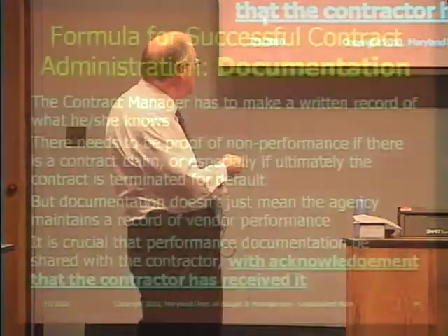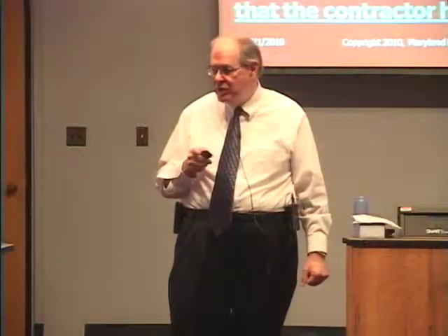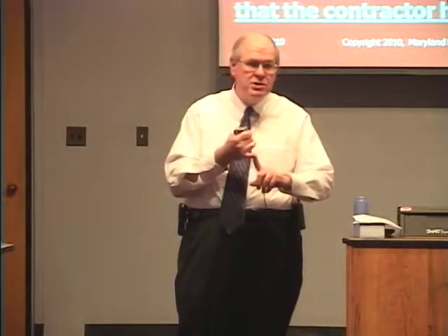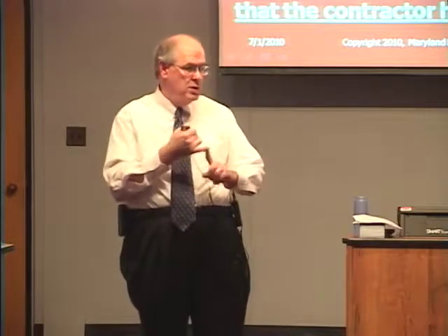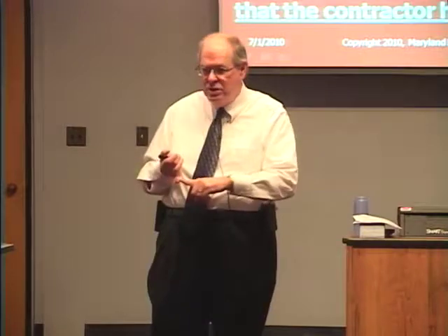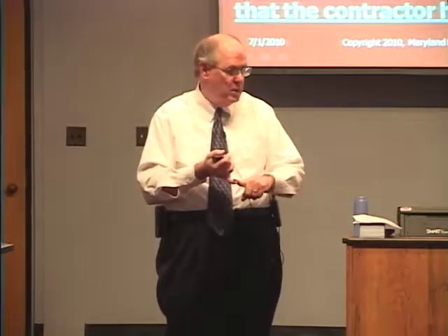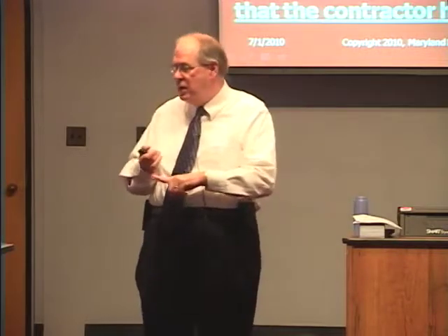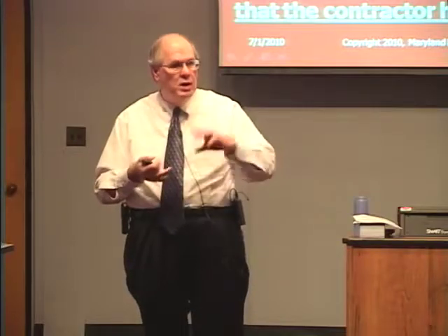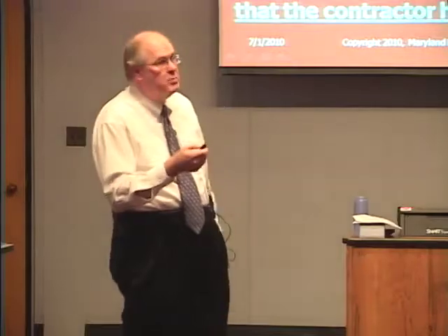And the other thing you want is, if you provide documentation to the vendor, you want them to acknowledge that they have received that documentation. That doesn't mean they necessarily agree with it, because as we're going to say later, they can give you a rebuttal to your documentation, but you have to have some evidence they at least received it. If they agree with it, you want them to sign that they agreed with it. If they don't agree with it, you allow them to give you a rebuttal, and all of this will be kept in your contract management file. So you need to document.